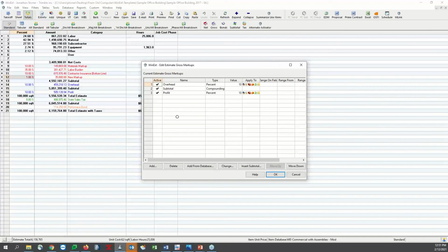When I've done Excel estimating, I've had owners, bosses, that have had 65% or 45% or 55% or whatever it was, and they would just say, that's my overhead and profit. It was just a catch-all. It wasn't a true mathematical problem that they had figured out. They just figured that that was close enough to get their unit prices to be in good shape and also make a little bit of profit as well. They didn't really know where their numbers were. So in this case, within WinEst, we can calculate our overhead on the subtotal up above.